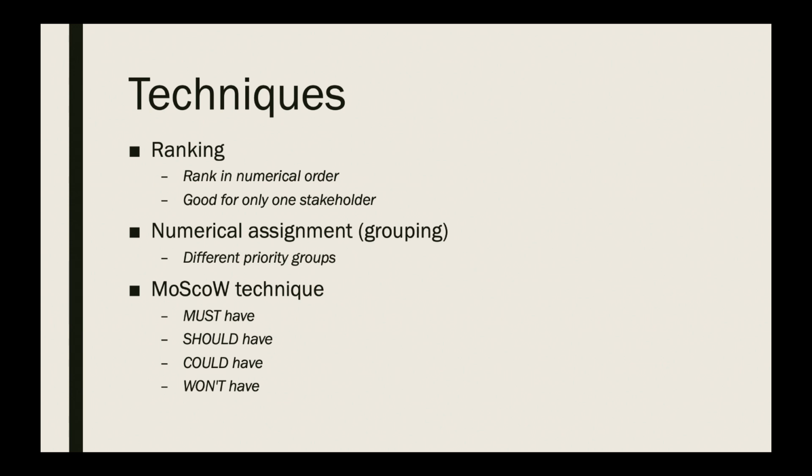Ranking could be an excellent method to use when managing requirement changes. In the plumbing system project, only one stakeholder appears, so no other perspectives will conflict with it. Also, weekly meetings are held to catch up with constant change demands, so not a whole lot of changes need to be identified every time.